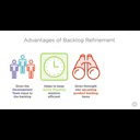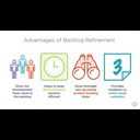This meeting is an opportunity for Dave to share some of these estimates to check their validity with the development team. If he finds that they're significantly off, having this session within the sprint gives him a few days to consider any trade-offs that he may make in the backlog item's details to better bring it in line with the original rough estimate, or to remove other selected items for the next sprint so the larger item can fit.